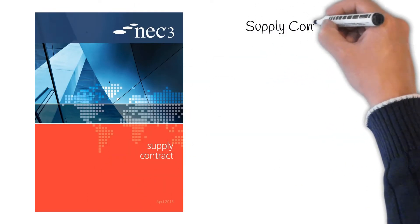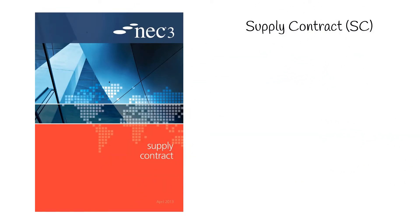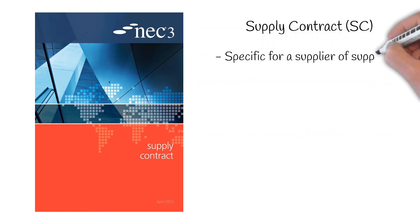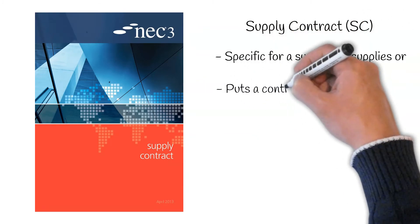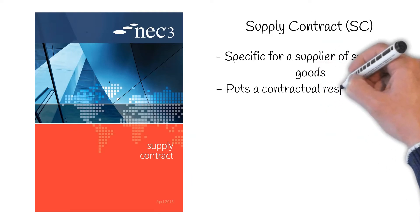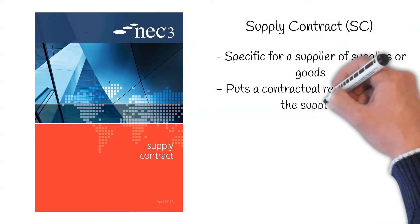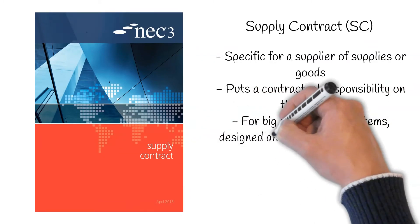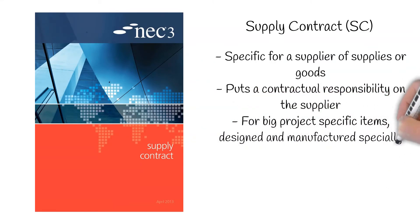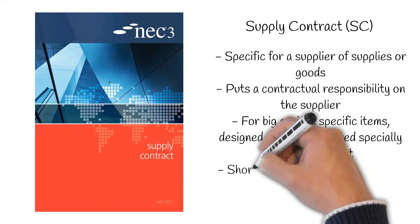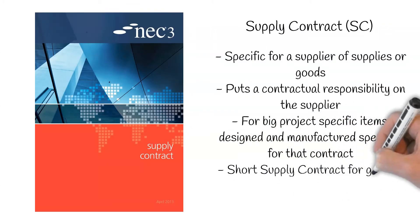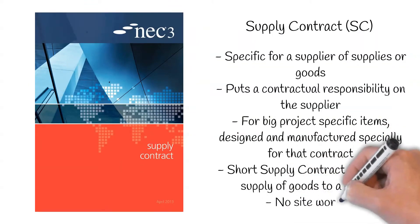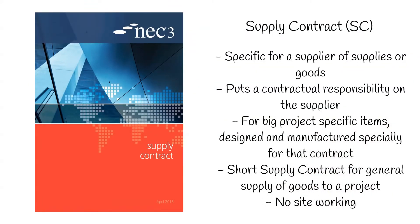Supply Contract, or SC for short. This contract is specific for a supplier of supplies or goods. The purpose of this contract is to put contractual responsibility on the supplier during a construction project lifecycle. The Supply Contract is used for big project-specific items which are designed and manufactured specifically for that project. The Short Supply Contract is for more general supply of goods to a project. Neither of these contracts cover site working.